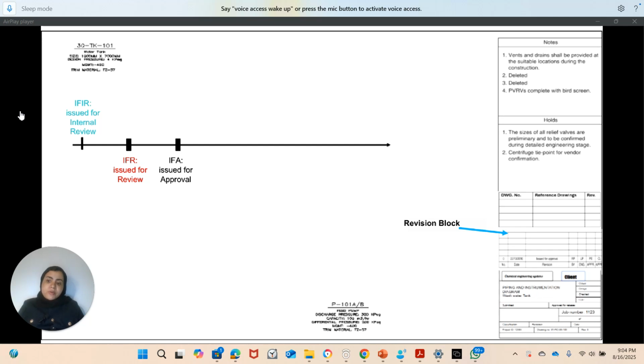There might be some changes before they approve, and you, as the engineering company, might negotiate with your client, to explain why you have taken those steps. So there will be some negotiation and communication with the engineering company. If they are approving that, they will approve the P&ID. Otherwise, you will do the changes which are required, and then at the end of the stage, it is approved.